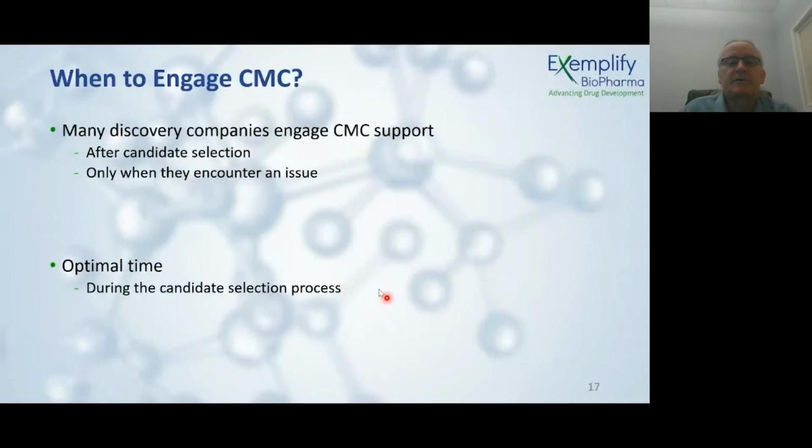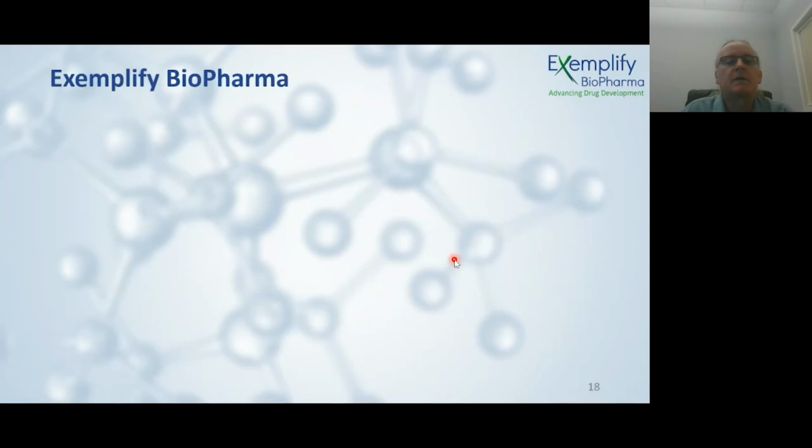In our experience, I would say the optimal time to engage the CMC folks is towards the end, around the time you're going to select your candidate, because there you can have the most impact on the timeline and get the best understanding of what issues may be coming up during the preclinical workup, let's say, for the IND. So that's pretty much my talk on the CMC.